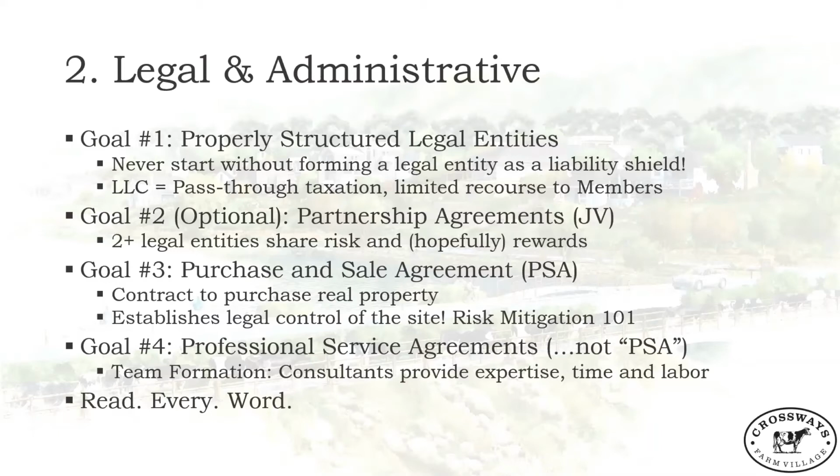So Crossways Ventures, the partnership, now makes the LOI legally binding. And the way you do that is you enter into a purchase and sale agreement, which we call a PSA, with the Puttergills. You have a contract to purchase the property after a 180-day due diligence or option period.